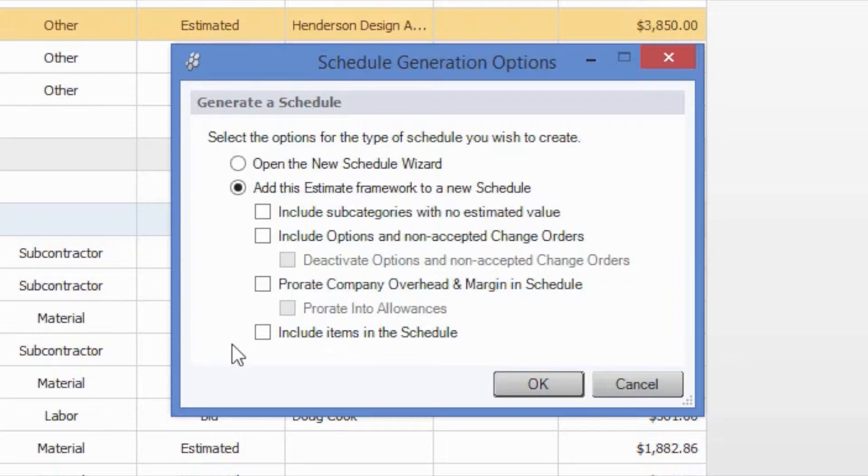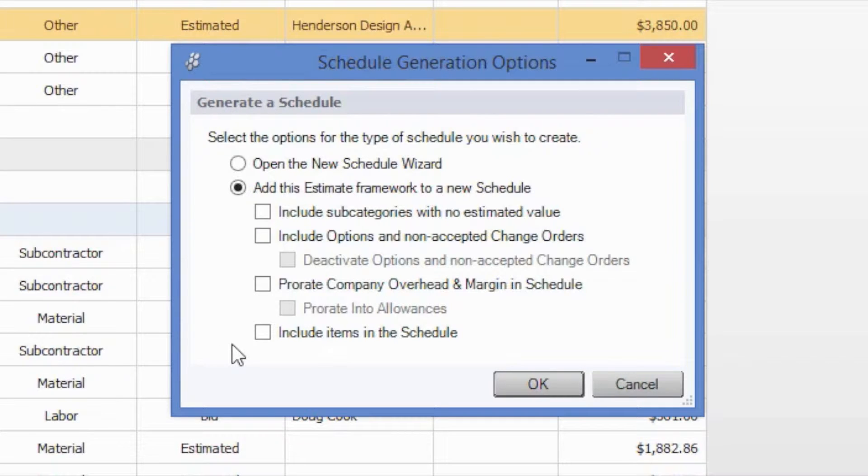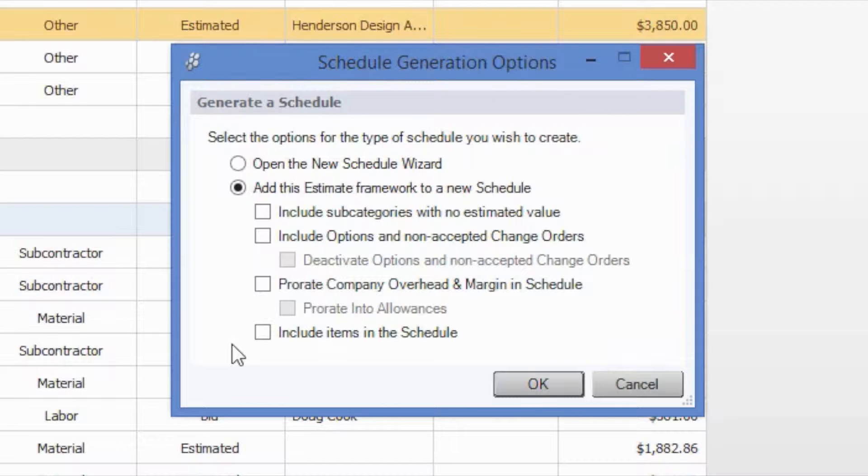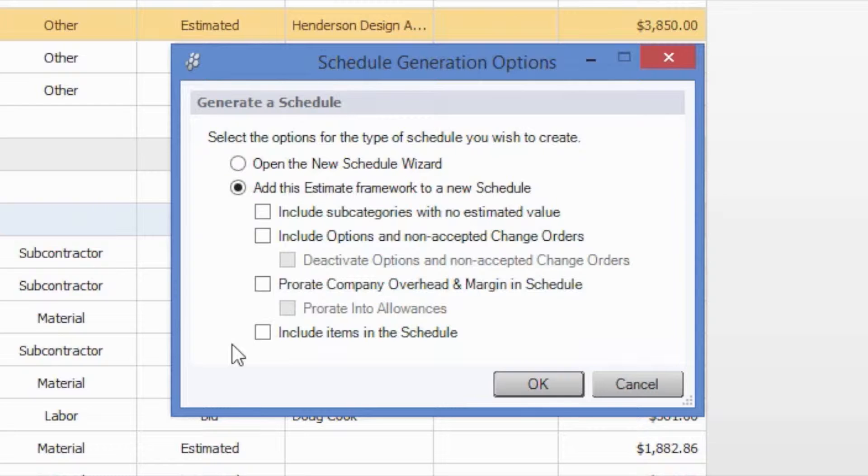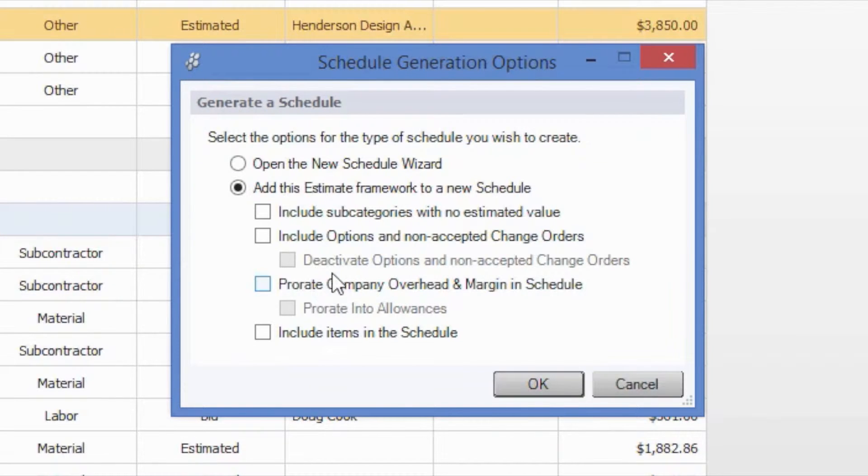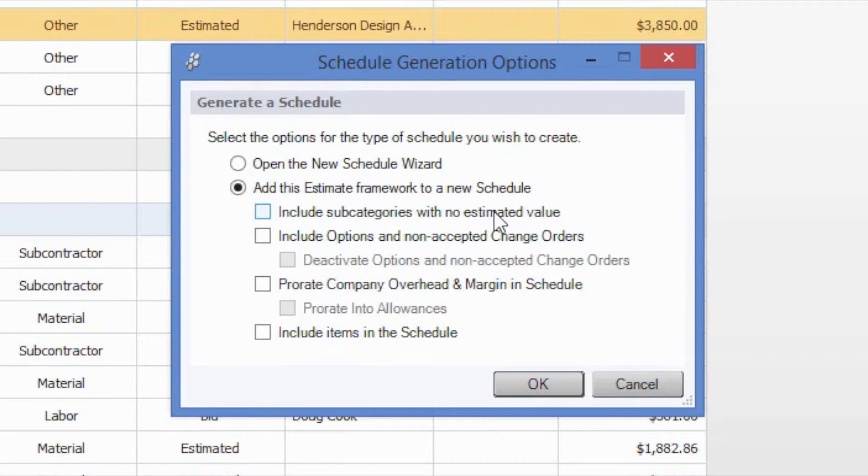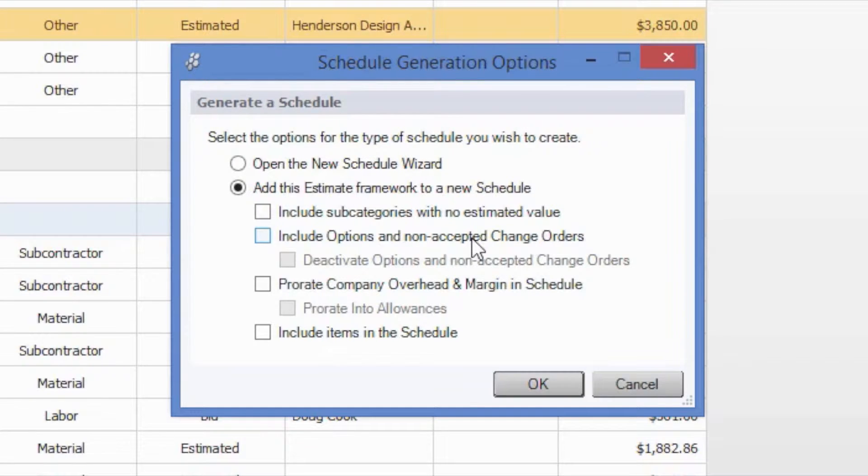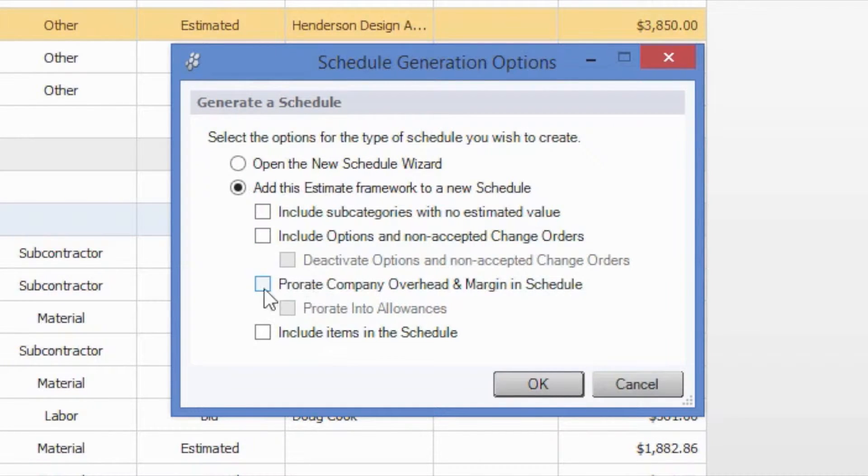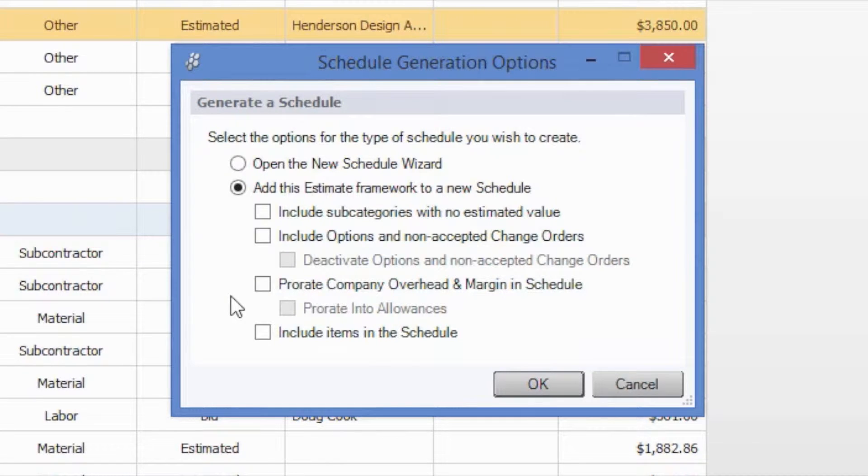The schedule will also only be populated with subcategories or categories that contribute to your project total. This means that options, pending change orders, or any estimate subcategories with no value will not be populated on the schedule by default. However, you can see here that we do have the option to include these subcategories if we would like, those with no estimated value, those for options and non-accepted change orders. So if you do want to include those as well as the overhead margin prorated throughout those dollar values, you have that ability as well.